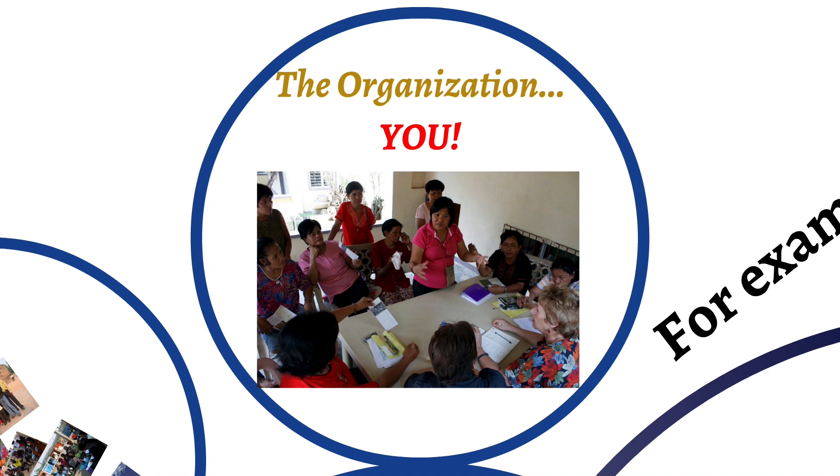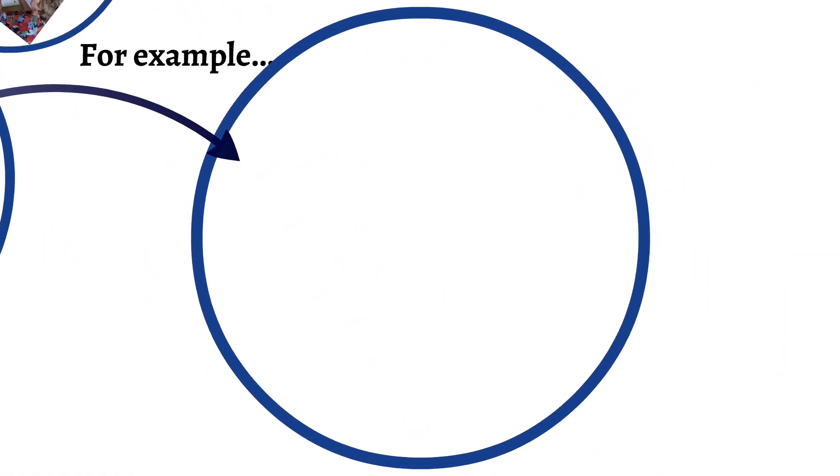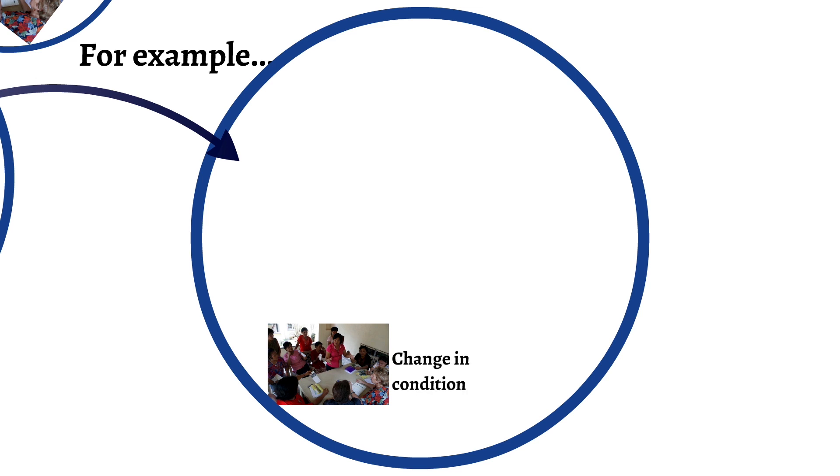So I just want to use a quick example to illustrate what I've been talking about here. So for example, imagine that you are a member-based organization and you want to create a change in condition for your members who are home-based workers. And the change in condition you want to create is giving your members access to equipment they need to improve productivity. And this is the change in condition. You've gone from no access to the tools and now they have access to the tools. This is an outcome. This is the change in condition that you've created for your target group.